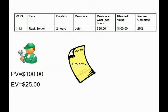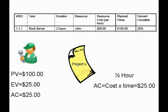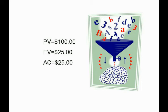Actual cost represents the effort expended to arrive at the current completion level for the deliverable. We've created $25 of earned value on our task, but now we need to compare the value created to the cost incurred. Looking at the timesheet, our engineer charged one half hour to the project at a bill rate of $50 an hour, so the actual cost for this task so far is $25. So we have our planned value of $100, earned value of $25, and actual cost of $25.